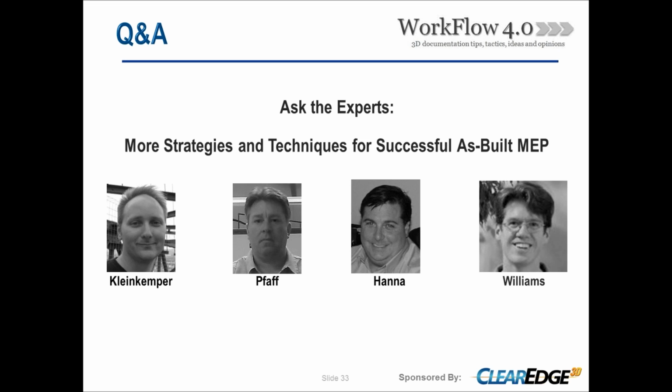I think it's interesting that you both said 20 to 40. We tell people 30. For phase-based, that's sort of the average that we'll expect to get a day, and it sounds like we're all saying the same thing. Obviously, if you can turn your resolution down, you'll get more, but it better be very big stuff that you're trying to capture. So if you need small detail, then you've got to crank it up. So yeah, I agree with all of them.